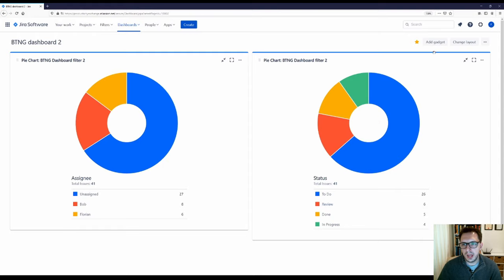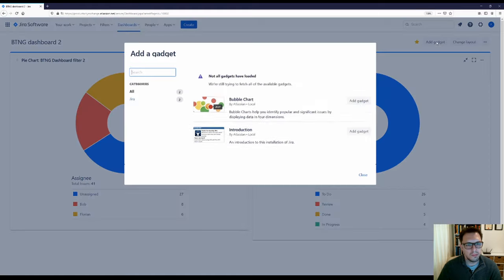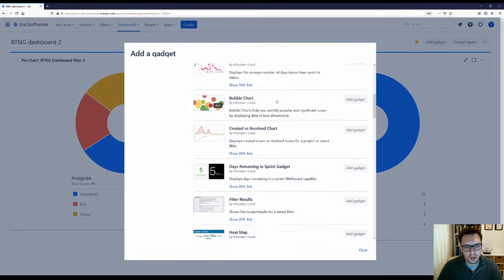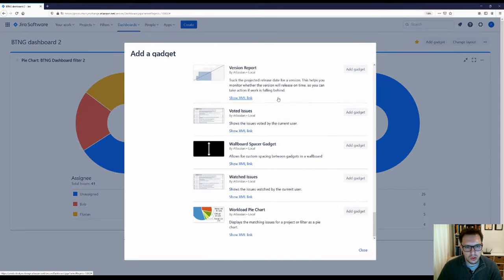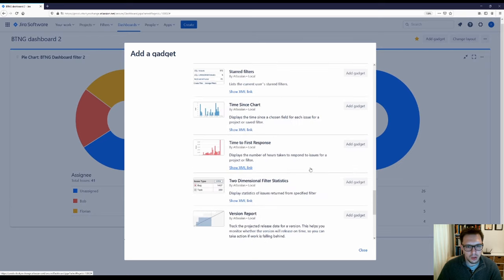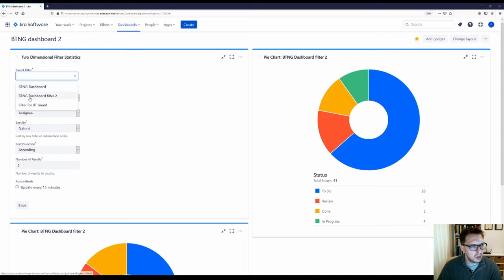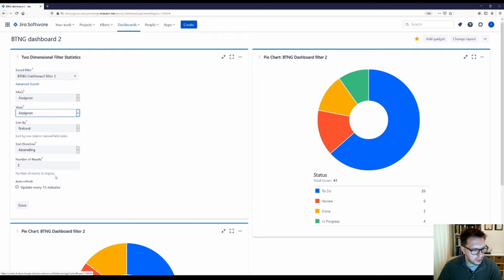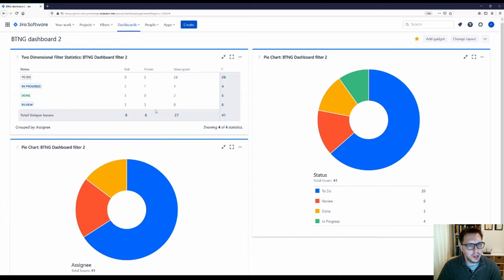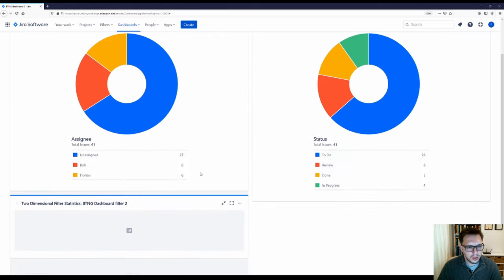Now the last thing I want to add is a gadget — load all gadgets, and the one I'm after is the Two Dimensional Issue Statistics. These are all in alphabetical order, so I just add the gadget, close, and search for my BTNG Dashboard Filter Two. On the x-axis I want the Assignee, on the y-axis I want the Status, and I'll set the maximum number of results to display to 50. I click Update and Save. I can then rearrange it to wherever I want it.